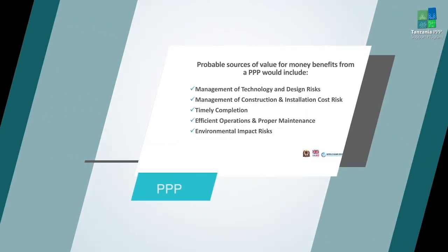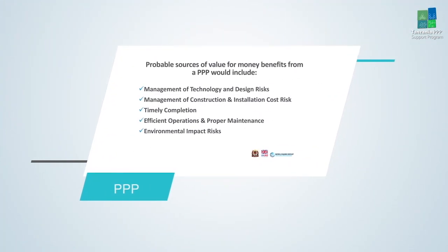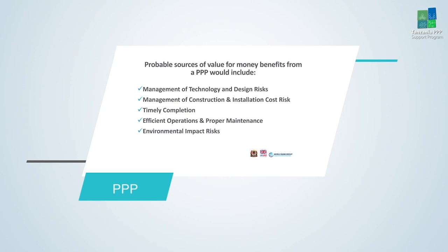So, are industries going to willingly pay more money to bring their wastes to be treated at a new hazardous waste treatment facility? Are they going to do that willingly? You have to make sure there's a law. Sure, so part of this that goes into the feasibility and pre-feasibility study: what are the existing laws? Is the law that requires that in place? Usually you see that this is done through a licensing process.